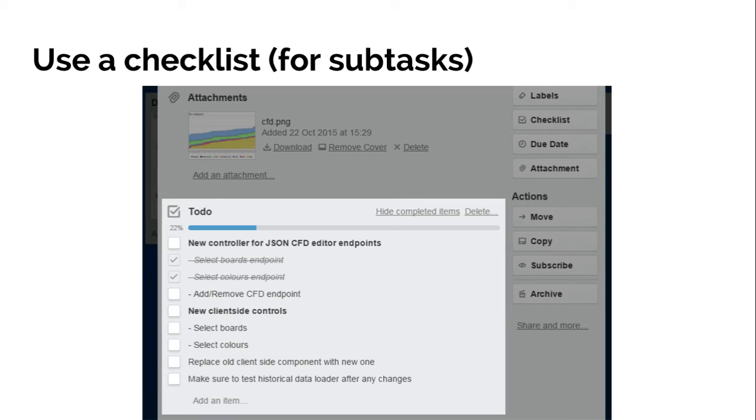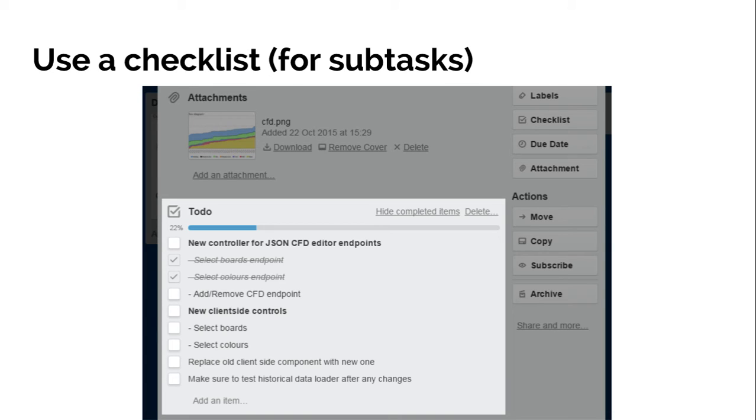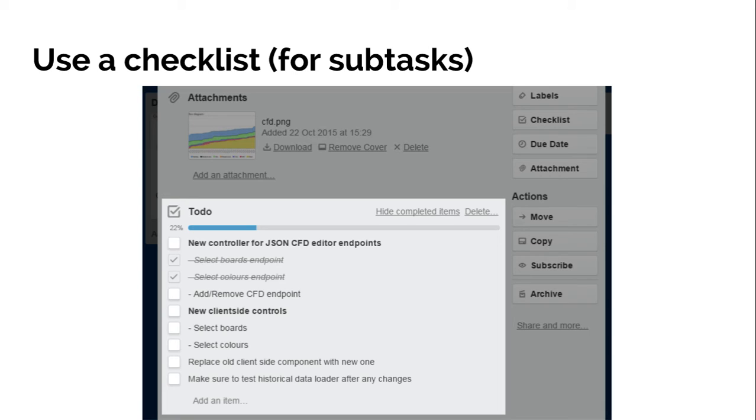And then for subtasks, the best thing to do is checklists. And this works excellently well, to be honest. You can have Markdown in the checklist here. So I've created even sub-checklists here. I've got my two bolded headings with sub-levels and then just some regular checklist items to be checked off. So that works if you want to just take a story and break it down into individual chunks. But it's also useful if you want to have multiple checklists. The testers and the devs can have their own sections if they want. And you can also have checklists that you copy from another card. So that notes list over on the left, you can have template cards in there with a checklist for a code review. And then every task that you want to have a code review on, you can immediately copy that checklist in and then everyone knows what they need to do. And if you update that, then obviously it gets updated on all future cards that you create. And as far as subtasking goes, I think works really nicely.